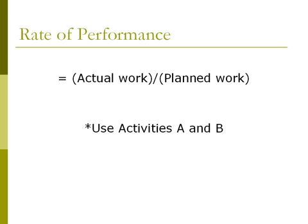To calculate the rate of performance, we will divide the actual work by the planned work. Since only activities A, B, and C have been completed so far, we will only use these activities for the calculation. However, activity C is not part of the critical path, so we will only use activities A and B for the calculation.